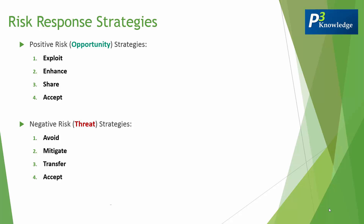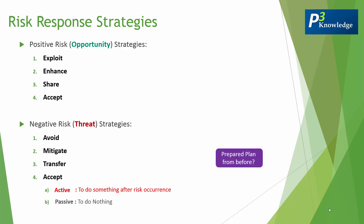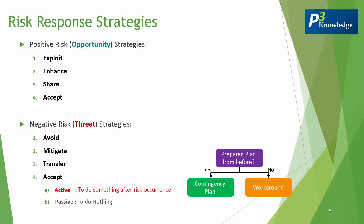However, there is one more part to accept for the negative risk — we have active and passive acceptance. Active acceptance means to do something after risk occurrence, while passive acceptance means to do nothing. For active acceptance, when the risk materializes, if you have prepared a plan beforehand to deal with it, that's called a contingency plan. However, if you did not have one and on the spot you improvised a way to deal with that risk, it's called a workaround. And if your contingency plan did not work out and you have a secondary plan — normally called plan B — here it's called a fallback plan.